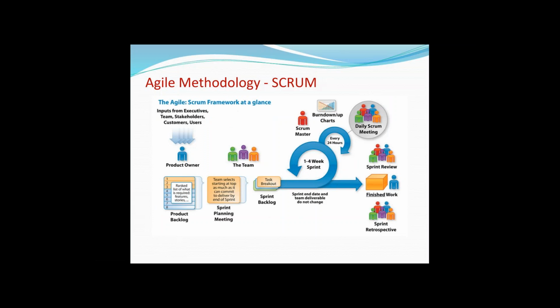Now, as I said, sprint is nothing but shorter duration of work where you try to achieve different functionalities. The first thing, in a sprint, I'm trying to explain the sprint at a high level. Understand this. If you don't understand, stop me. Okay. So in a sprint, what happens is, let us assume that there is a team of 5 developers and 5 testers. Now, in a sprint, if it is for 2 weeks, generally sprint can start on any day, but let us assume that the sprint starts on every Monday. Okay, every alternate Monday. So on Jan 1st, let us assume if it is a Monday, when the sprint starts, on the first day of the sprint, all the team members get together and will decide or discuss what are the functionalities that need to be prepared or developed in the first sprint.